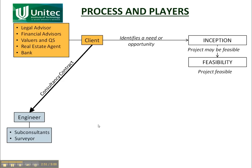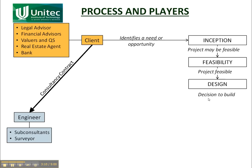If they decide that the project is feasible and the client decides to proceed, then we go on to the design, which is usually done by the engineer — remember, engineer is the same thing as consultant. From that we've got a design and an engineer's estimate for how much it's going to cost. Then the client makes a decision: do I want to build it, do I want to carry on with the project? If he doesn't, then the project's over, or we might repeat the design.